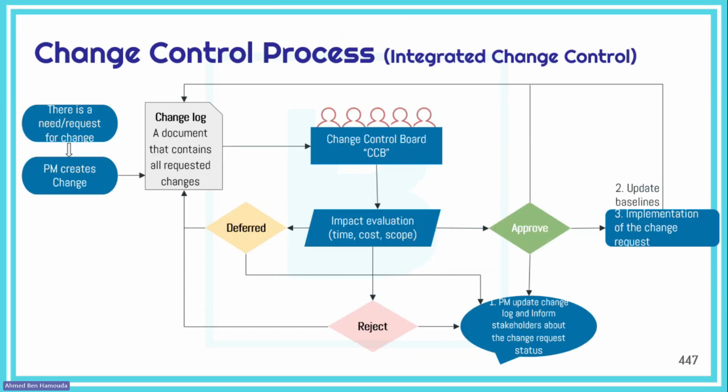No matter what the cause is, if there is a need for a change, because those causes could impact the baselines, the scope baseline, the schedule baseline, the cost baseline, then definitely we need to have a change request.